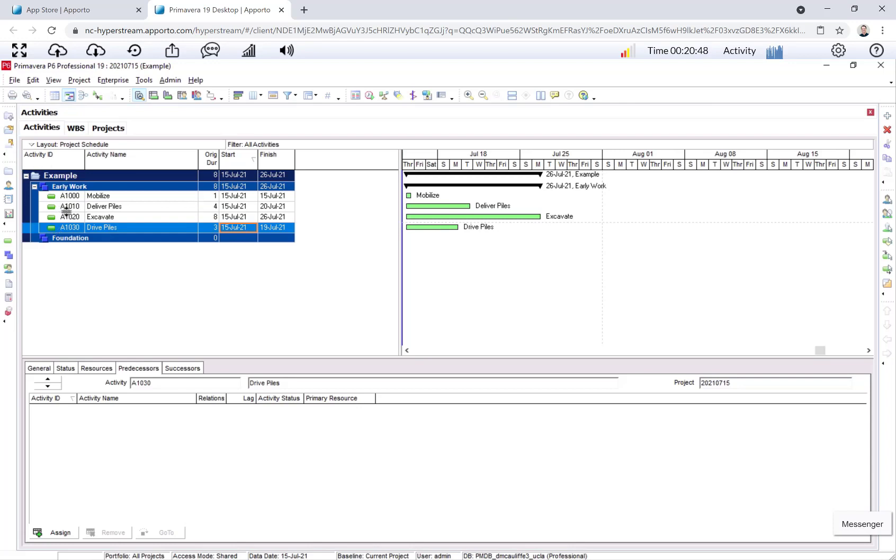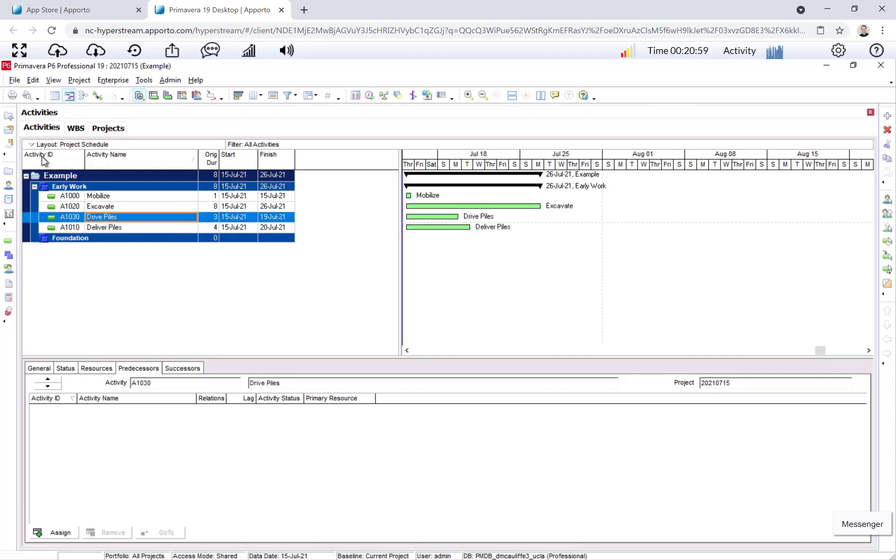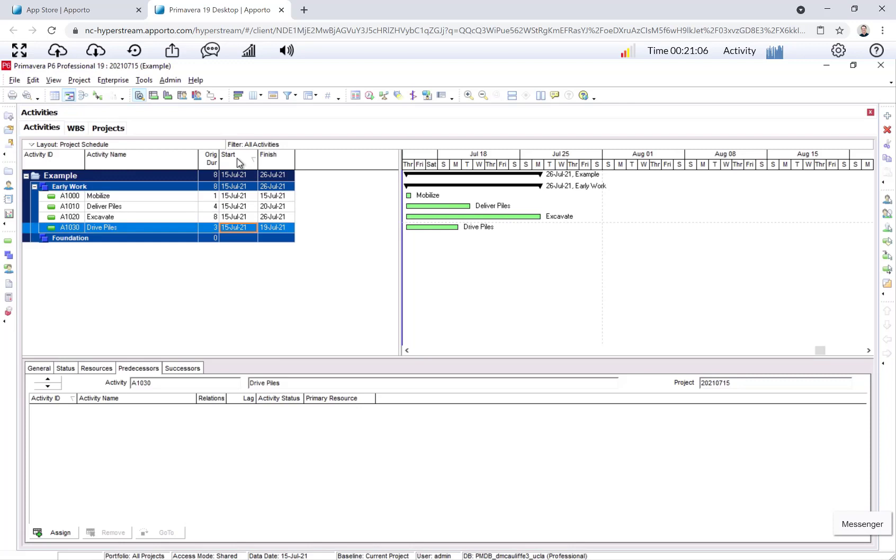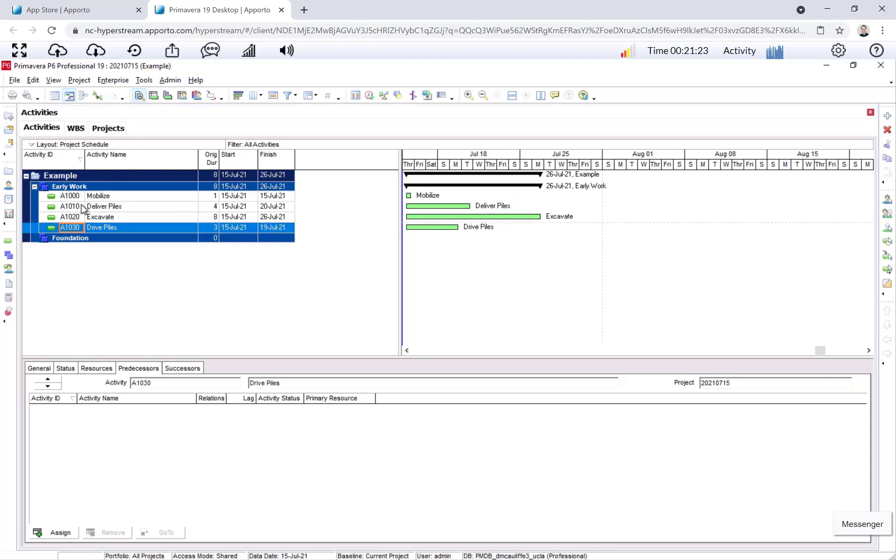I've seen a lot of new P6 users really stress out about how these activities show up. At the end of the day, we are going to assign logic and schedule the activity. You'd want to sort by start date so that you get a cascading view of a schedule. But when you're brand new, usually you want to sort it by activity ID because you're usually adding the activities in the order that which you want to assign logic.